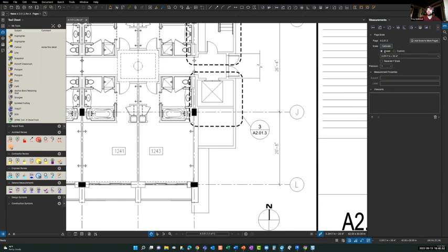You'll notice that there is a preset in here. And if the title block says 1/8 inch equals a foot, you can go ahead and select that, and it will set the scale of the drawing to what the title block says. I will teach all of my students, including you guys, to never do it that way. There are 2 ways that you can print the drawings. You can print scale to fit or fit to scale. One of them is actually going to be to scale, whether it fits on the paper or not.